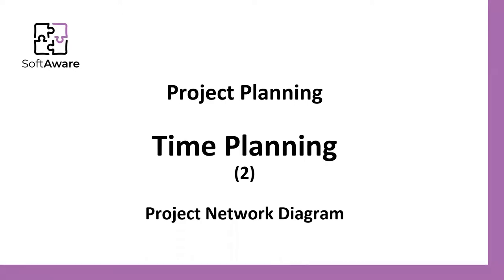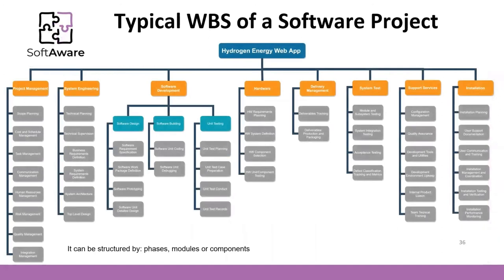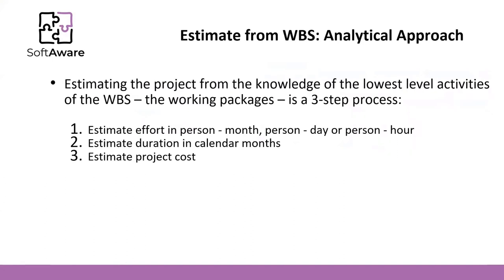Let's make a wrap-up of what we have learned in previous sessions. First, we talked about scope planning and the work breakdown structure — the way we decompose the work into fields, phases, modules, or components until we reach the work packages, which are the lowest-level tasks. With these work packages, it is possible to make an estimation of effort for each work package in person-month, person-day, or person-hour, and use that effort to obtain the duration in calendar months.